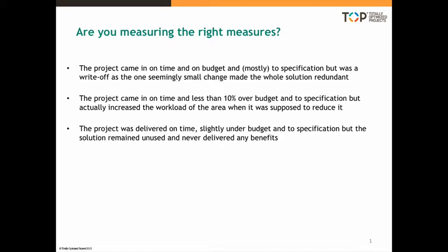Are you measuring the right measures? Here are some real case studies. The project came in on time, on budget, mostly to specification, but was a write-off because one seemingly small change made to the design of the solution made it redundant. All that expenditure wasted.